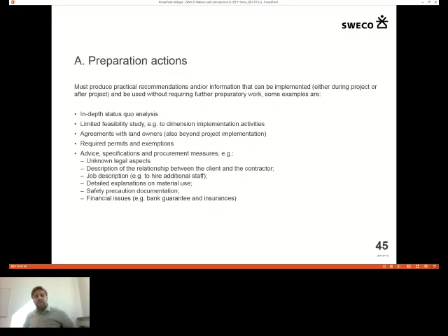And then, of course, to prepare financial issues. For example, the bank guarantee, even if it sounds quite straightforward, is usually a quite time-consuming story, because at least local banks in Sweden are not very experienced with making bank guarantees within EU-funded projects that follow a specific template and so on. So usually you spend lots of time on coordination, or basically conflict mitigation, with a bank to make sure that you keep a good agreement and that they still agree on it.